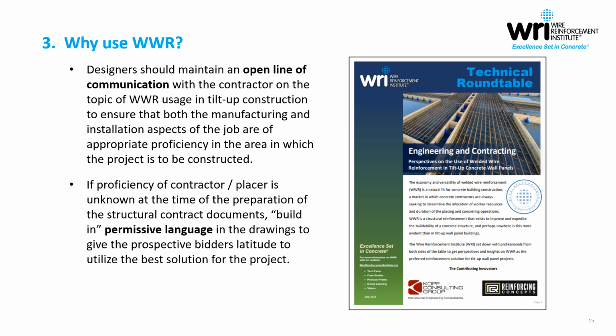So if that proficiency is maybe unknown at the time of the preparation of the structural contract documents, it's certainly worthwhile for the engineer to build in permissive language to give the prospective bidders some latitude to utilize the best solution for the project based on how they typically operate and their conventional means and methods.